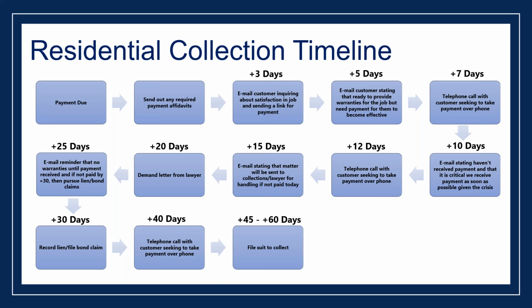After 5 days, email the customer stating, hey, we're ready to give you the warranties, but in order for us to give them to you, you got to pay me. Okay, and that's the thing, is you can always hold those warranties over their head because it gives you the opportunity to say, hey, we have this extra benefit, this extra value that we can give you, but we got to get paid. Okay, after 7 days, you got to pick up that phone and say, hey man, what's going on? Why am I not getting paid? Let me take your payment over the phone. We'll get this done. We'll get those warranties out to you. We love you. Everything's great.